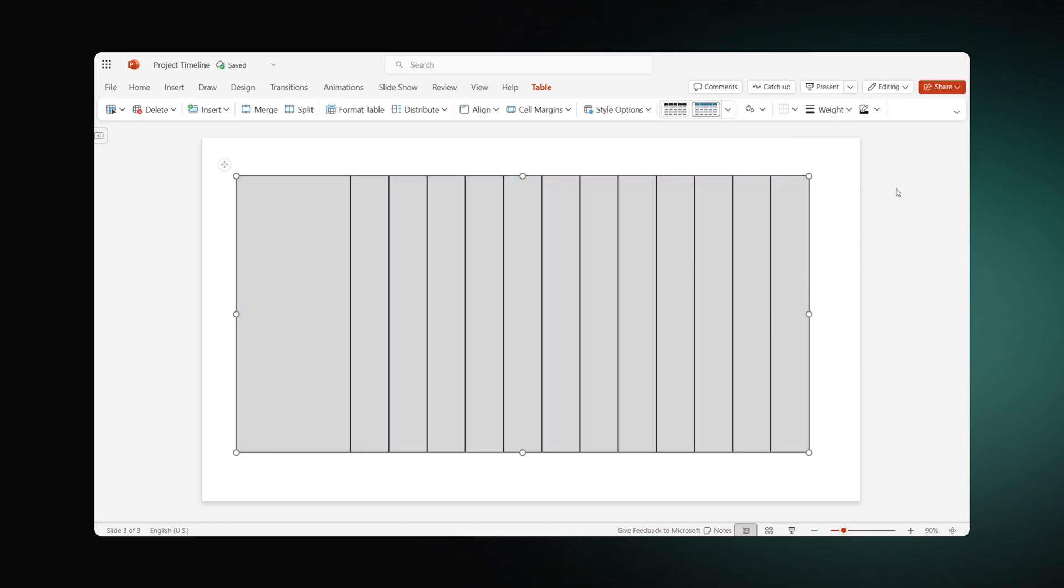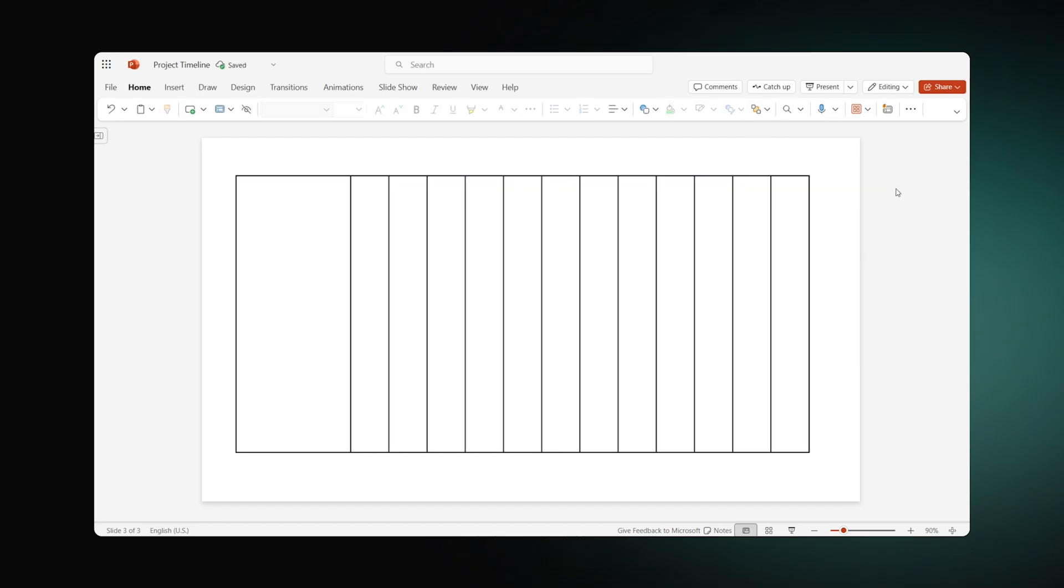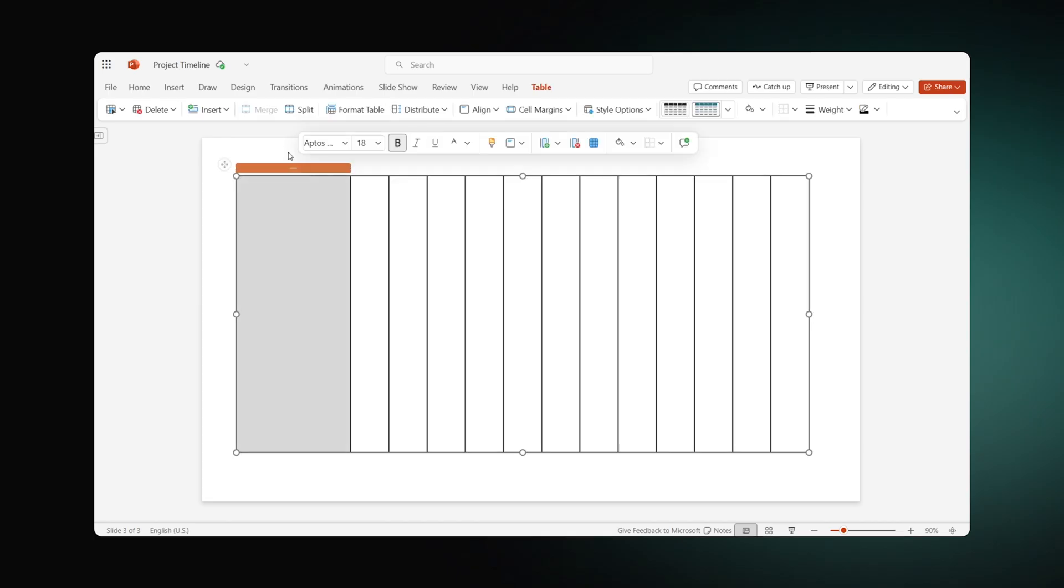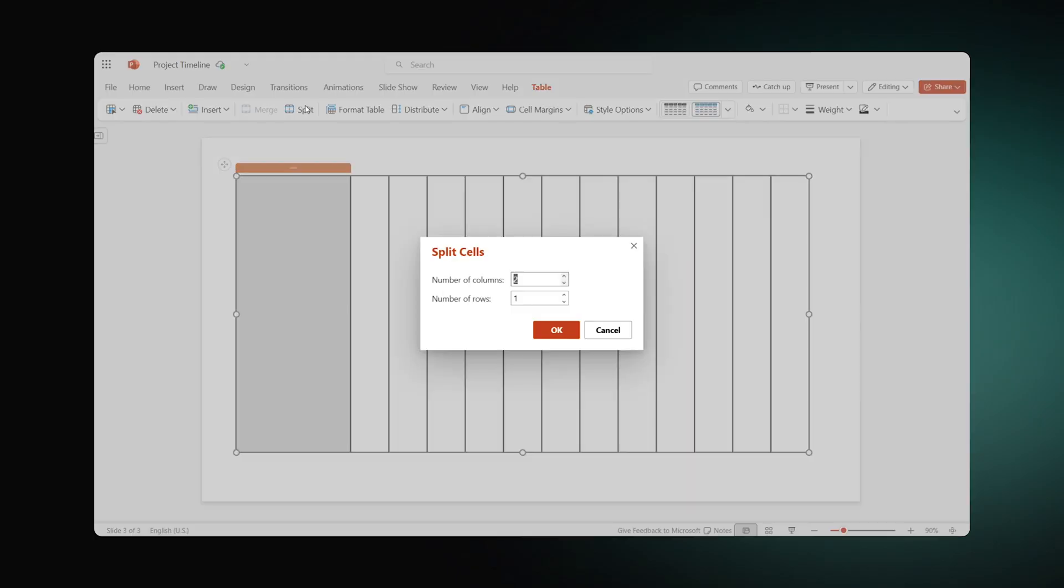Now let's go back to the technical aspects of the chart. Here we have to split the first column into multiple rows. For that, select the first column and click Split. Set the number of columns to 1 and adjust the number of rows to the amount of your tasks.